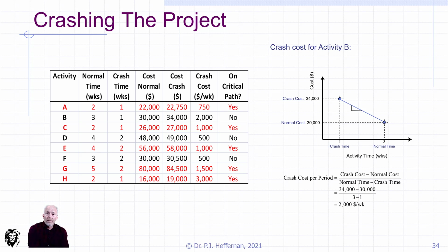It may be implied, based on doing that calculation, that we're saying it's linear, that maybe we don't need 2 weeks, we only need 1 week. So we'll go from 3 weeks to 2 weeks and only spend $2,000 instead of the 4. And that may not be true.